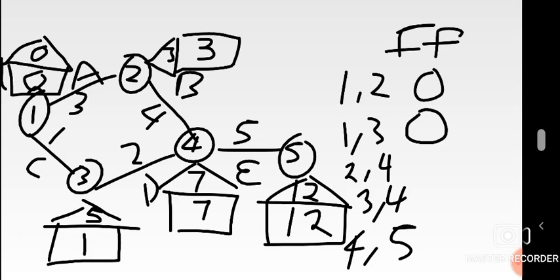You do the same thing for activities 1 to 3. The earliest start time of the ending node, which is 3, is 1. The box shows you the earliest start time. Just remember that, like a box-like structure. Then the triangular part is latest completion. And then you do that.